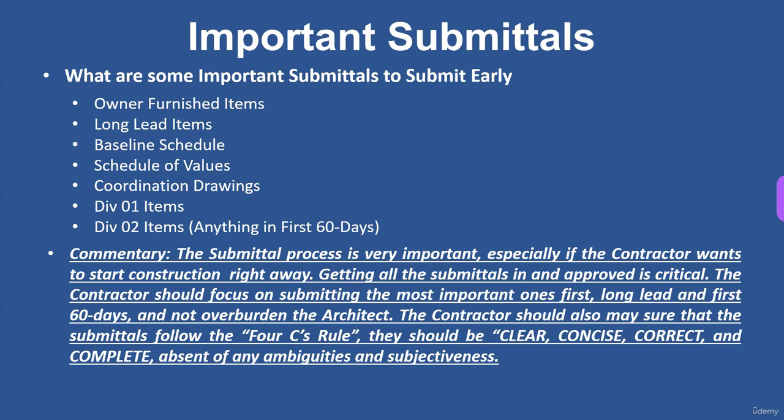And if you don't know something, that's when you have a conversation with the architect. If you need to RFI it to confirm something, but you shouldn't be just passing paper. You should be reviewing these submittals. Most specifications require that the submittal has the contractor stamp on it, that they reviewed and approved it. So sometimes they're just rubber stamping and sending it along, and if it comes back with all these things missing, then the contractor's not doing their job.